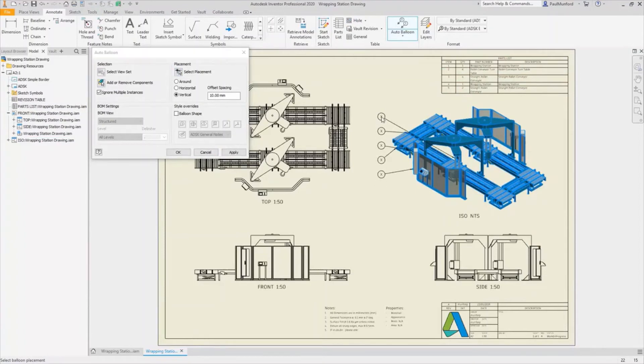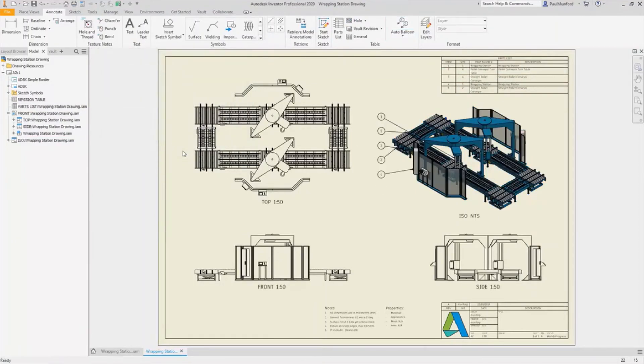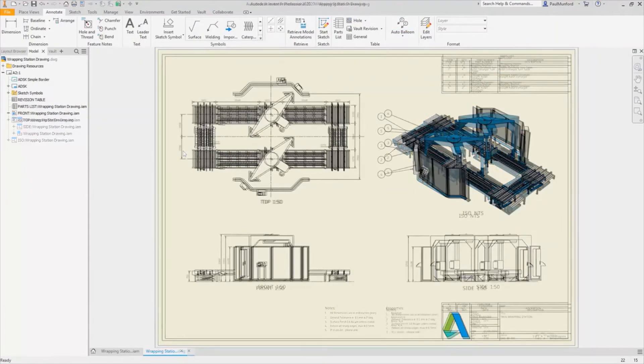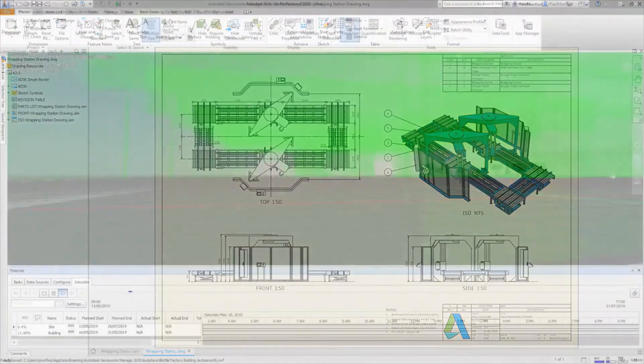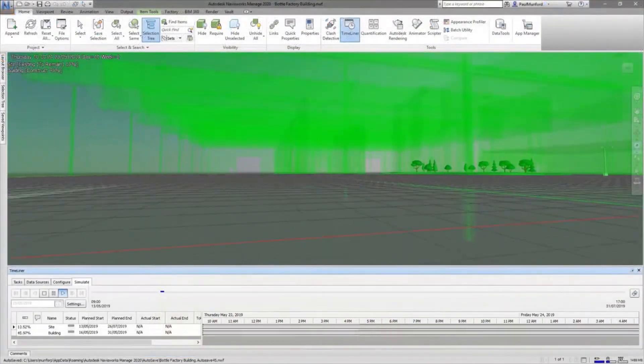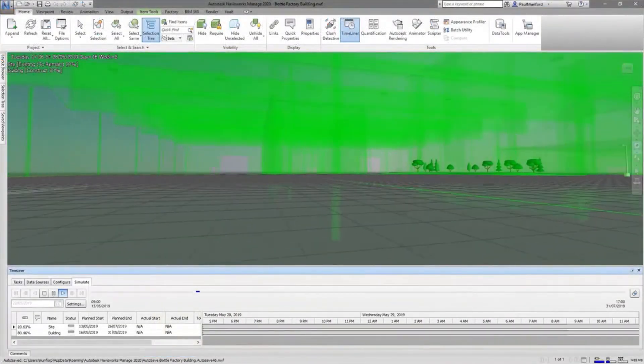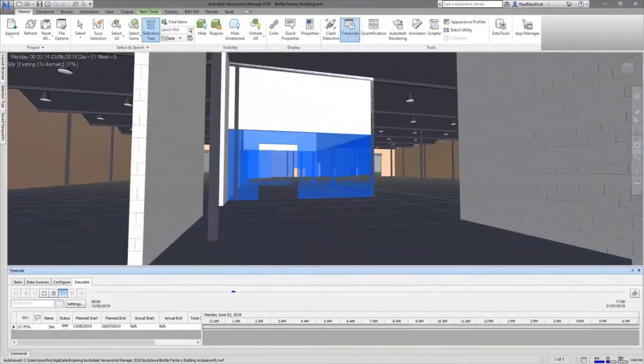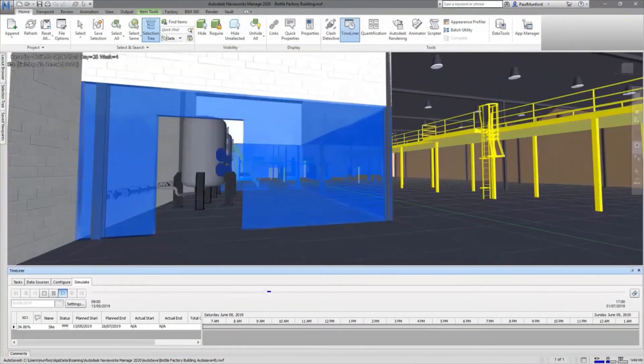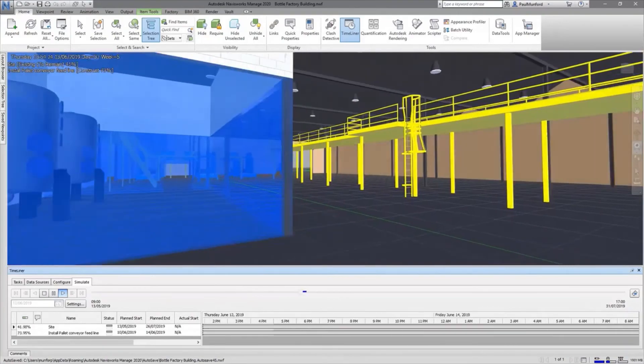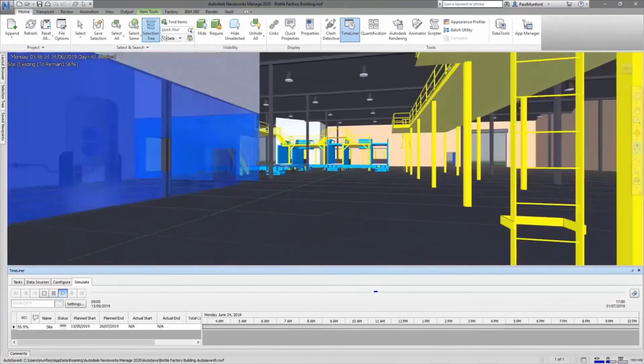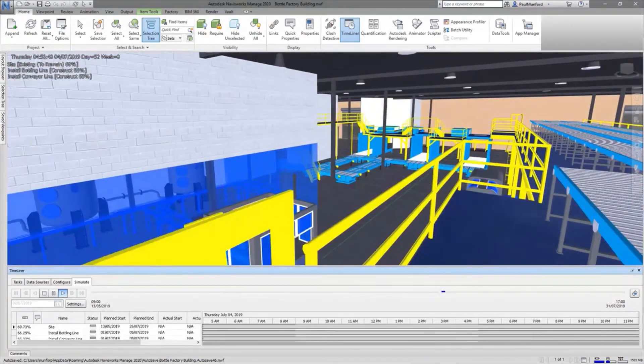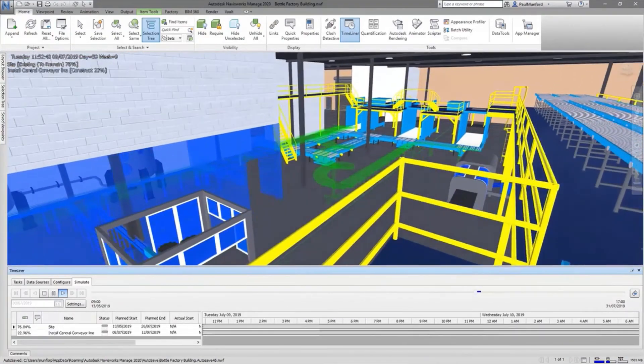The 3D model is also used to generate the equipment bill of materials, saving time and reducing the errors caused by a manual takeoff. During the planning phase of your project, incorporate scheduling information from Microsoft Project or Excel into your model and animate the project sequence to communicate your plan and look for problems.